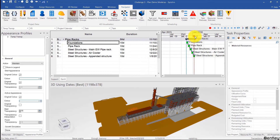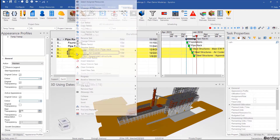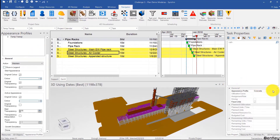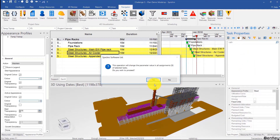Now these last three activities are actually steel activities, so I'll select those, right-click, select assign to tasks, and then change from task properties under resource — change the appearance profile to steel.